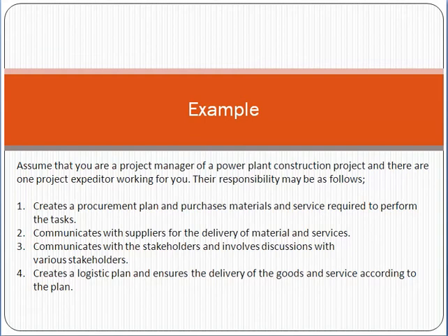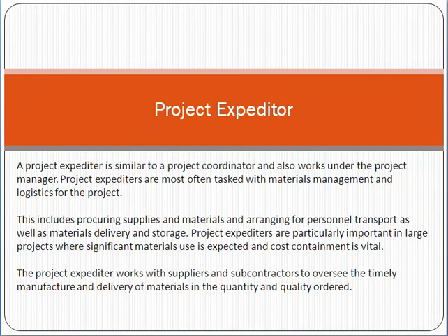So what is the role of a project expediter, friend? The project expediter has to purchase and procure a few things, and he has to plan the logistics, like how things will move forward, how things will go from one location to another. So all these are the role of a project expediter. Friend, a project expediter is similar to a project coordinator and also works under the project manager. Project expediters are most often tasked with material management and logistics for the project.